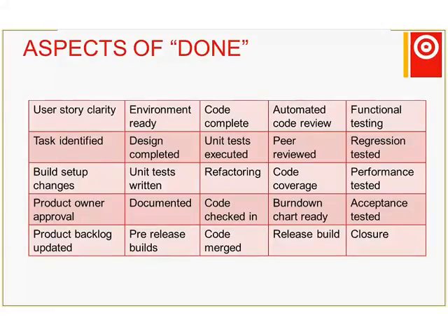We can only know if something's done if we know what it actually is. So we do need a clear user story. We do need a clearly defined task. We need the approval of the product owner so that they know they've defined the product backlog item carefully. And we need to make sure the backlog items are updated to say what has been worked on them, what impediments have been achieved. We need to update the backlog items with respect to adding new fault reports if required.